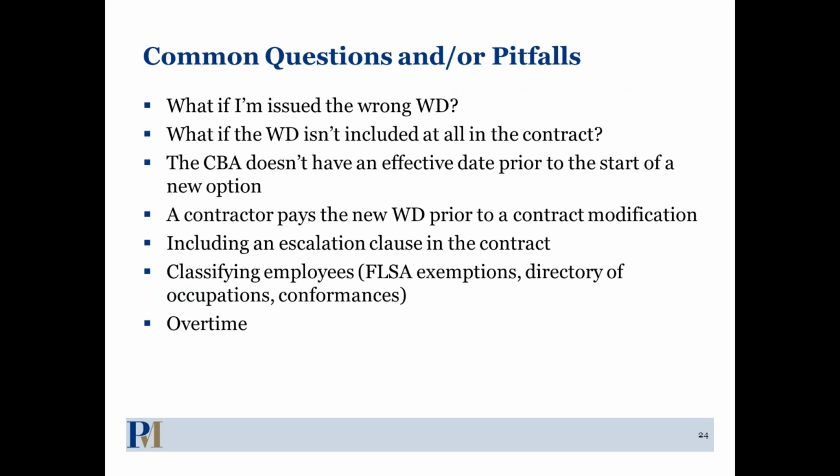And we talked a little bit about escalation before. Make sure you classify employees correctly. That's critical. It's really hard to do. So exempt, non-exempt classifications, making sure people are in the right labor categories are really, really critical. And checking to see if you need a conformance, which basically is there's no category that applies to my people, so I have to go ask DOL for one. And that's a whole process. And remember that overtime can be an issue as well. If you've misclassified somebody, chances are you could have overtime issues. So those are some of the big pitfalls that we see.